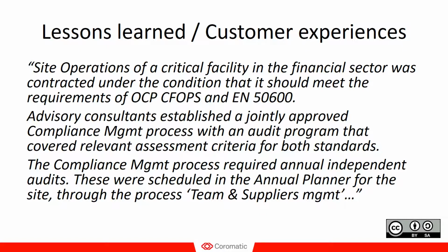So basically what they did was they developed the audit questionnaire that covered both the Open Compute Project framework and the European norm 50600, so that there could be performed an audit that covered both of these at the same time. And then the compliance management process that they established required an annual independent audit, as that's part of the contract. And then these were scheduled in the annual planner for the site through the process team and suppliers management.